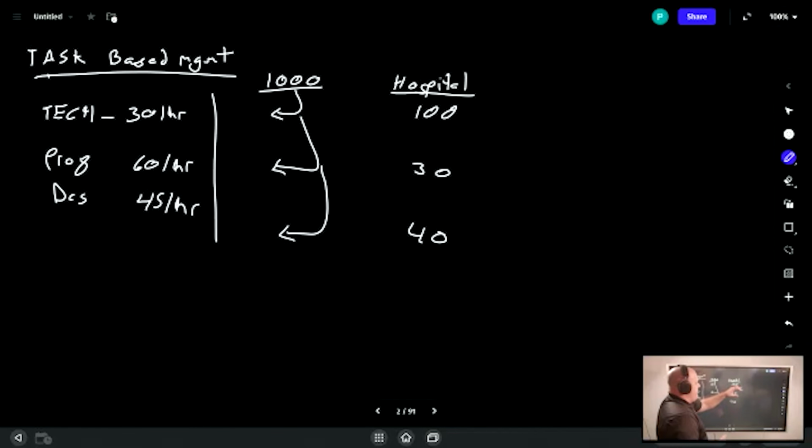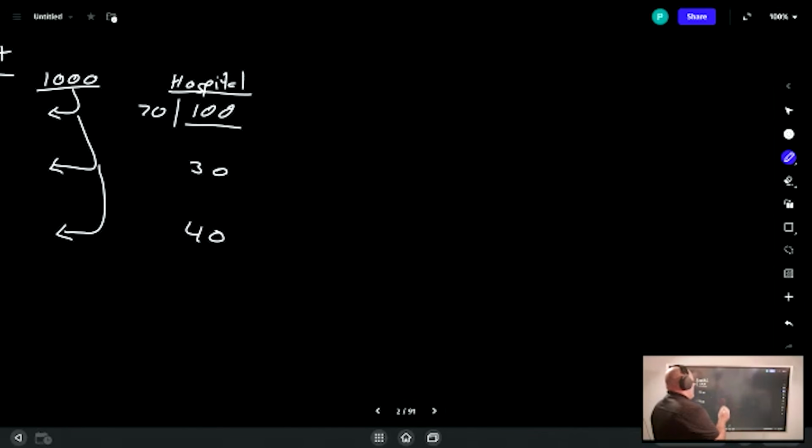And your sales team is going to be able to have more accurate estimates. You're also going to evaluate if the estimate was right, but your team was inefficient. You're going to be able to evaluate, okay, why was my team inefficient? Let's say the estimate was 70 hours, but we did 100 hours as a technician. And what we learned is that we didn't line out our subcontractors right. Well, then what's going to happen is we are going to move into what's called a process pattern.